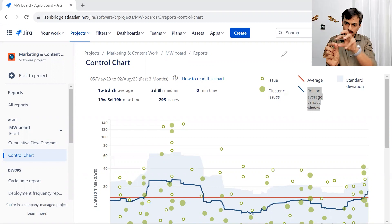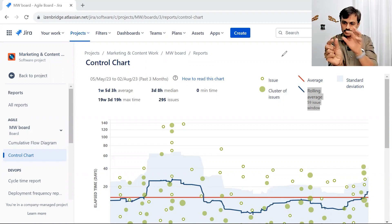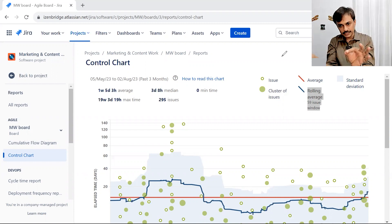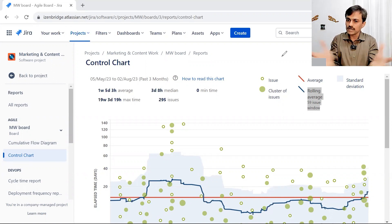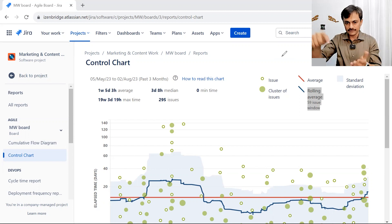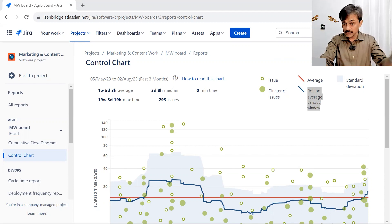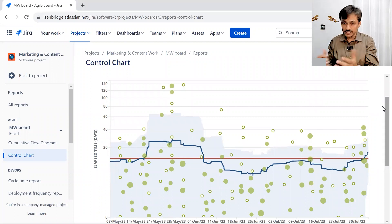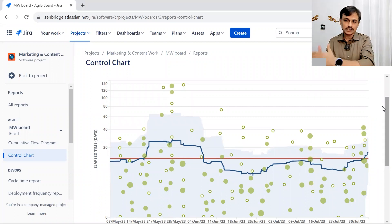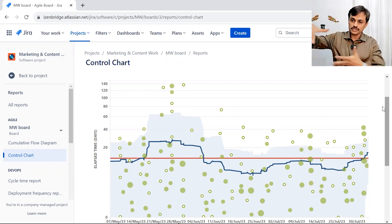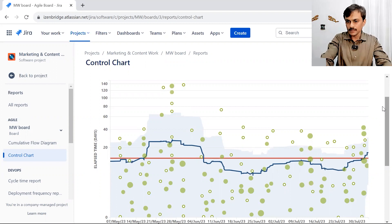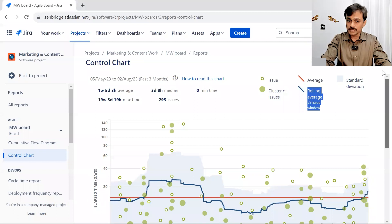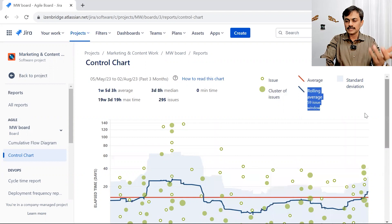Say the window number is 9 — for a given issue, Jira takes the four issues before it and four issues after it and creates an average of the cycle time; that is the rolling average. The overall average is just one flat line, but the rolling average goes up and down. A rolling average going down is good — it means we have a trend of reducing cycle time. Going up means the opposite. A minimum of five issues is needed to create the rolling average.